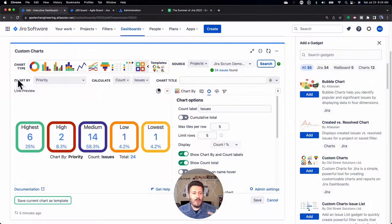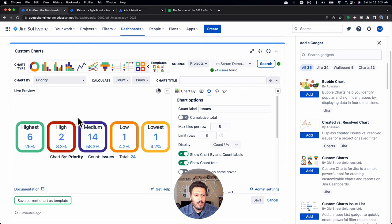This is the most important part. I want a complete breakdown of all my issues based on their priority, because the way I like to plan and execute is I take care of the highest priority first. Highest priority to me usually means if I don't do this item, something bad is going to happen. So I'm going to tackle those highest priorities first — whether it's a bug, a story, whatever the type may be. Whatever is ranked the highest means that is the most critical thing your team should be working on, and I want to visualize that.